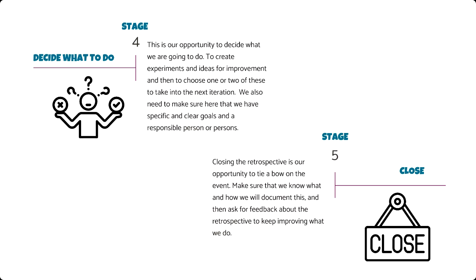And so here the team can generate ideas. For me, what I try to get teams to do is not just have one solution, and I learned this from Esther as well, is what you're looking for is at least like 3 options for the same problem, right? If we've got 3 options or 3 different ways to solve the problem, then we probably really, really understand the problem. But if we don't, then maybe we don't understand the problem that well, right? If we've only got 1, then we've got no options. And if we've got 2, then we've got a dilemma. But if we've got 3, then we've got options.